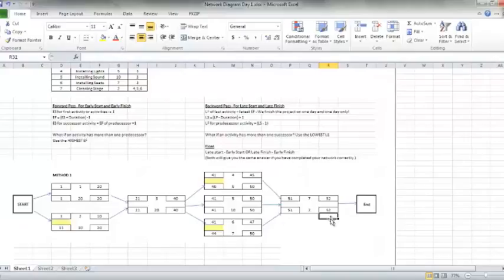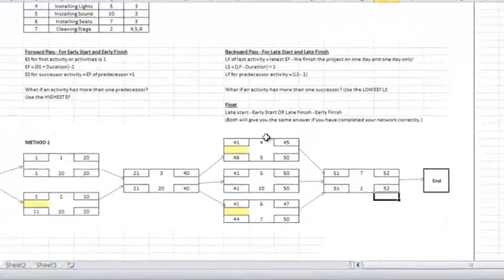The definition for the critical path is weird because it's that definition, which is the critical path is the most amount of time it takes to get you through the network, and therefore it is the minimum amount of time it will take to finish the project. When we look at some of the pieces of work here, we can see that there's a difference between some of their late starts and early starts, and late finishes and early finishes. And when that happens, we have a value for floats. And so what we want to do next is go through and calculate float.